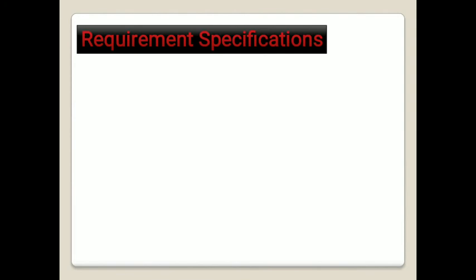Although requirement specification is very important in all kinds of projects, in your final year project it becomes even more crucial. The reason is that in other projects, there are sometimes ways of boosting the development process, such as asking for more time, more budget or more human resources. But in the case of a final year project, none of these can be applied, because the academic period cannot be extended and no one can be added to your project. Therefore, it is highly crucial for you to know what you are going to do.